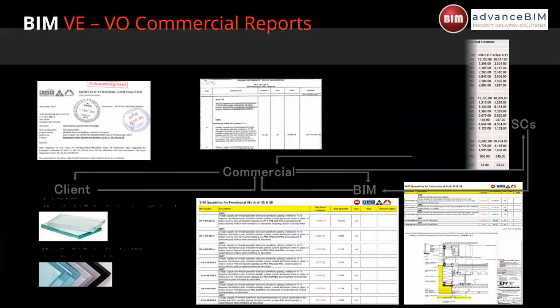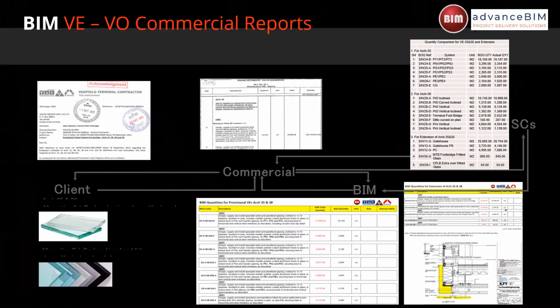Of course, in such a project with its size, complexity, and many stakeholders, it was very important to use BIM as a scientific way to control variations and variation orders. And we have used BIM to quantify the effect of variations. It was a peaceful way to ensure that all the stakeholders, whoever is claiming something and whoever is accepting the claim, are satisfied, because everything was visually inspected and scientifically approved.